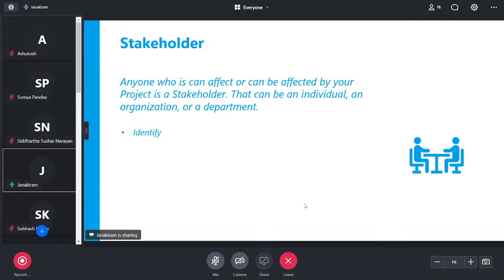And for you to effectively engage stakeholders, you need to identify stakeholders. From a best practices perspective, in this principle, the earlier you identify your stakeholders, the higher the chances of your project achieving its goal efficiently. Engage the stakeholders, analyze their influence. Stakeholders can be categorized under different categories, based on their power, their influence, and their interest in the project. You can categorize the stakeholders based on this, and you can communicate with them based on their category.